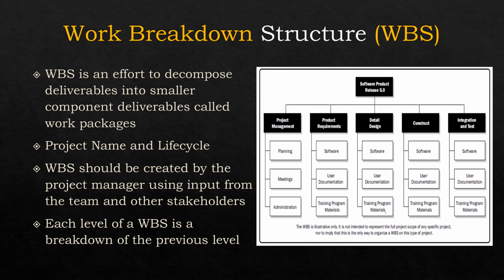WBS is an effort to decompose deliverables into smaller component deliverables called work packages. If you look at the diagram, these are the lowest level of deliverables. We cannot further decompose them, and these are called work packages. On top we have the project name.